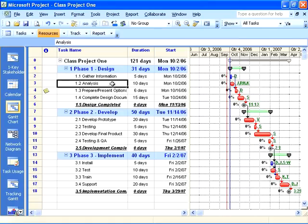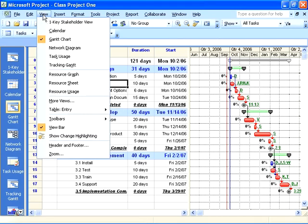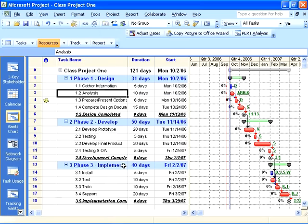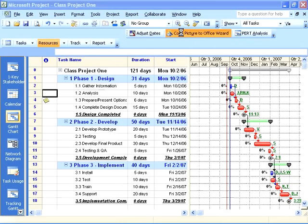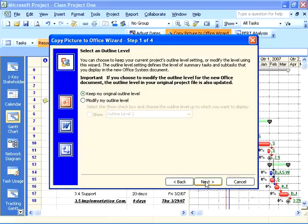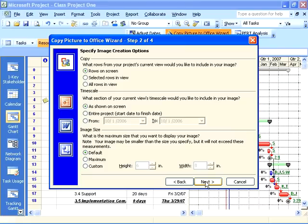Now project 2007 and 2003 also have a wizard to help you do this. If you don't want to remember how to go to the copy picture command, there is a toolbar. If I go to view and close to the bottom there's this item called toolbars and there's a new toolbar called analysis, new to 2007 and 2003. I can actually use in this toolbar the copy picture to office wizard. Basically it'll run you through the questions, the same thing that you would do manually if you went to the copy picture command directly. The copy picture to office wizard will allow you to get it into PowerPoint or into Word and even Visio for those people who like to use Visio.